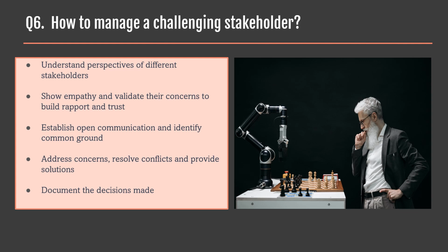She encouraged collaborative decision-making for the broader benefit of the organization and the restaurant, where they decided to let go of the live tracking feature in the first release and implement it in later versions with some more budget and time. This was a win-win situation for both Jane and the IT team, where Jane could get the feature included in the later versions and the IT team could implement the feature with increased time and budget. Mary documented all the decisions agreed upon to eliminate misunderstandings in the future.